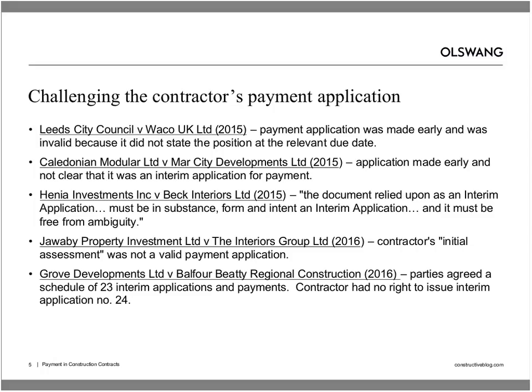And another decision from last year, Caledonian and Mar, again, quite similar facts there. The contractor issued its application halfway through the payment cycle. And I think in all other circumstances, all of the payment applications that it had made had been right at the end of the month. And again, the court said that it couldn't make an application early.